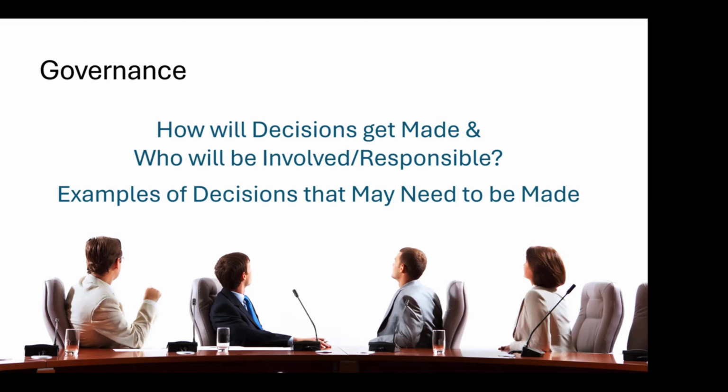So you say, okay, here are 1,242 exams that have a missing session number. What are you going to do with that? Or here are a bunch of exams that have session numbers that don't match the standard schema that you're using. So they may be foreign and unknown to information systems like an EMR. So what do you want to do with those? Do you want to generate new ones, prefix them, leave them as is? There's a whole bunch of things that have to be decided in those.